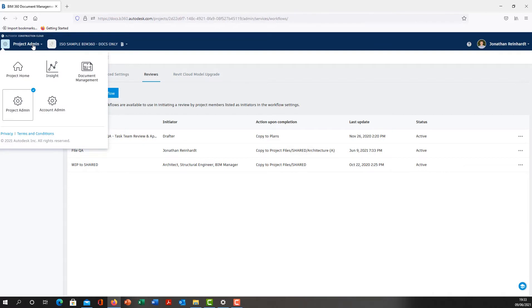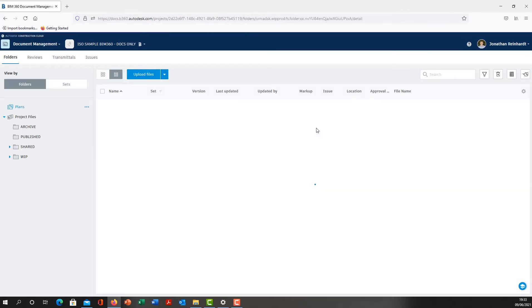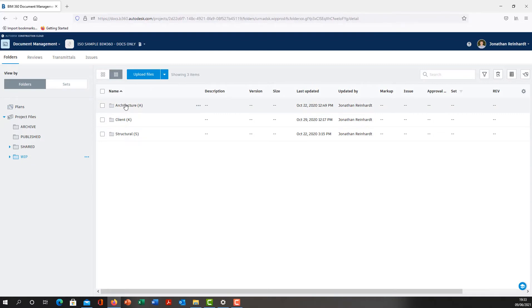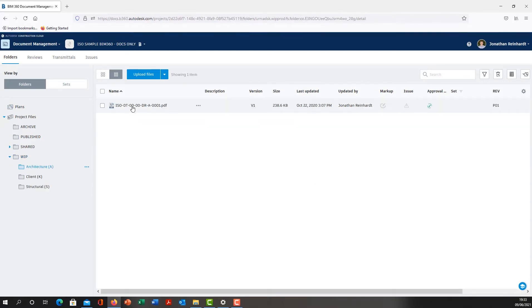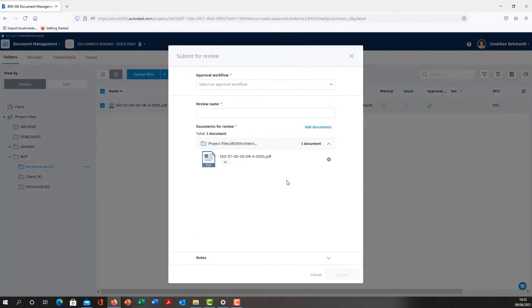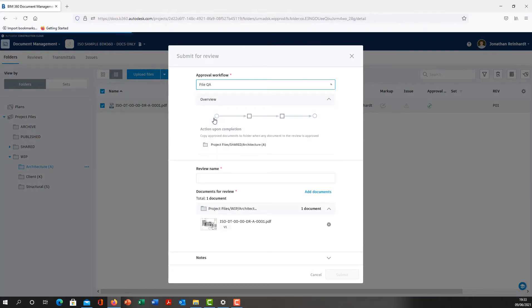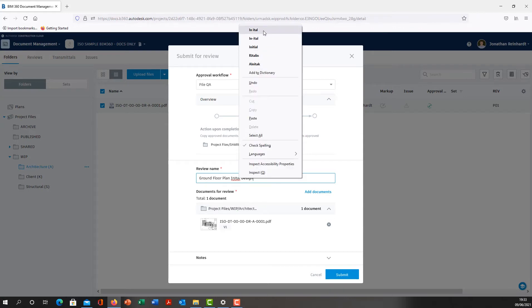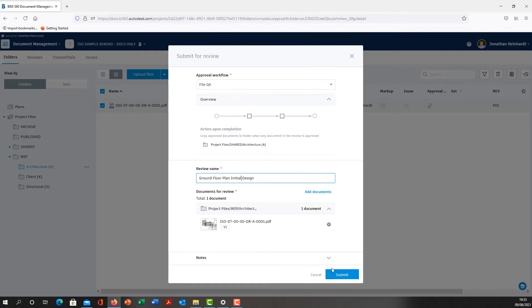Now I'm going to go back into my project, into my document management. You'll see that particular approval workflow now appears in the list of approval workflows available in the project. I want to go into my WIP folder as the architecture responsible individual and select this file. I can drop down the three dots, submit for review, then select that particular approval workflow we've just created called File QA. Review name: I'm just going to call it Ground Floor Plan Initial Design. Click Submit.